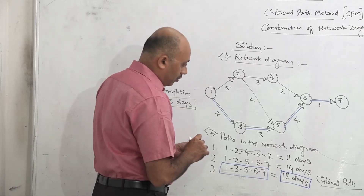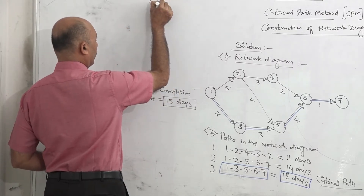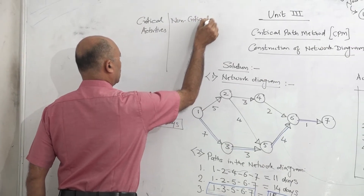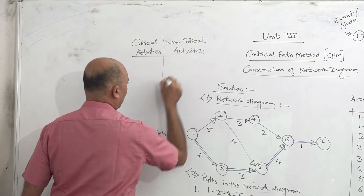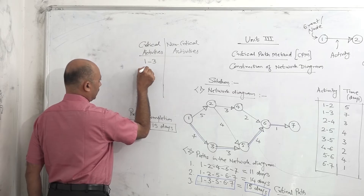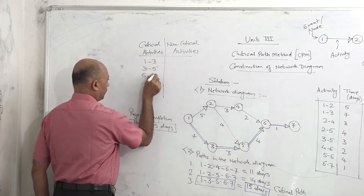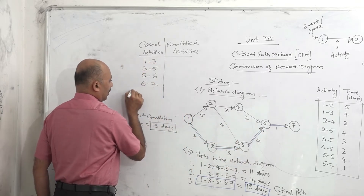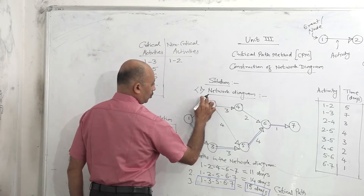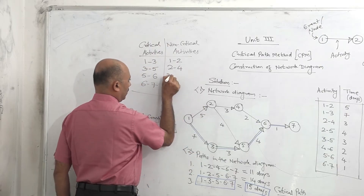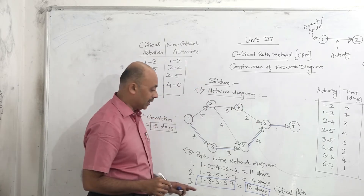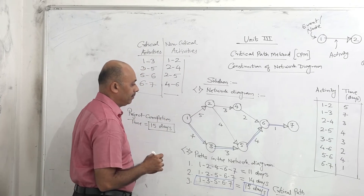Another concept you should understand is critical activities and non-critical activities. The critical activities are those activities which are on the critical path. For this example: activity 1-3 is critical, 3-5 is a critical activity, 5-6 is a critical activity, and 6-7 is a critical activity. All other activities not on the critical path are called non-critical activities: 1-2, 2-4, 2-5, and 4-6 are non-critical. This is how we construct the network diagram based on node relationship.